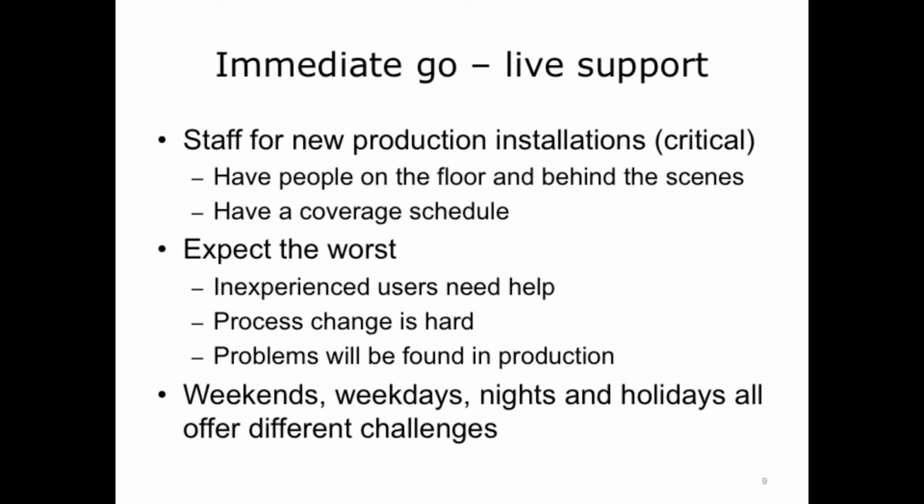The time right after go live is a time for extra vigilance in support. Expect the worst as inexperienced users need help. Process change is hard for users, and problems not detected during the testing phase will be found in production. Make sure to staff appropriately with people on the floor and behind the scenes. Have a coverage schedule, because if serious problems arise, people will need relief. Weekends, weekdays, and nights all offer different challenges.